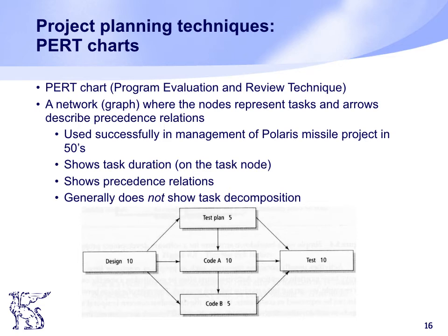It actually uses both the concept of Gantt charts and the concept of WBS. In a PERT chart they combine both techniques, and they get the benefits of both techniques. And after using both techniques, they create a map. In that map they show the network of activities and their interdependencies, and on the map each of these nodes represents an event, and the activities are represented by the arrows.